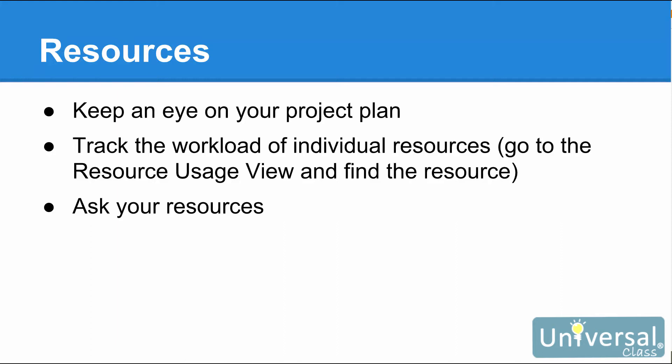There are three things you can do to make sure your resources are available and do not become over-allocated. You can keep an eye on your project plan by going to the resource graph view, where you can spot overbooking on tasks. You can track the workload of individual resources — take note of people who have put in a lot of overtime just to keep up with the schedule, as they may be over-allocated. To track resources, go to the resource usage view, select the resource you want to track, and the tasks assigned to that resource will be listed underneath. Ask your resources — take the time to ask them if everything is going okay. If someone is overworked or running behind, you can adjust the schedule or bring in other resources.